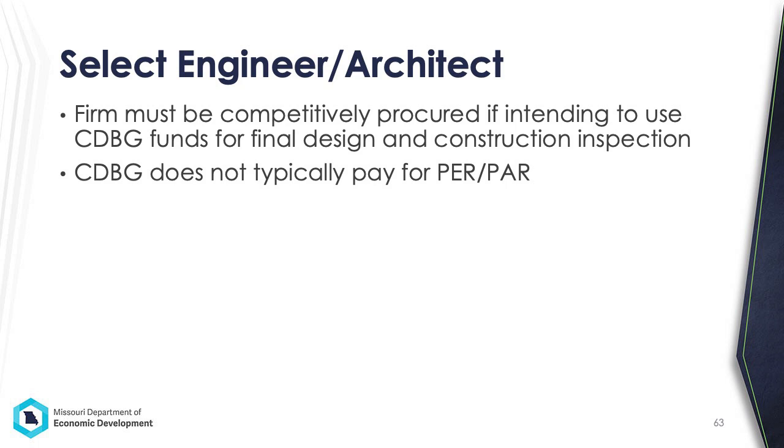CDBG does not typically pay for PERs or PARs, so it's important to separate the preliminary design scope from the final design and inspection scopes in the engineering or architectural services contract.